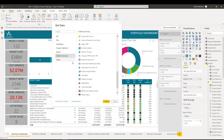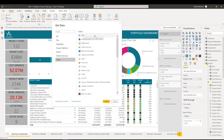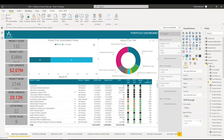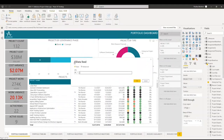If you click on Other and go to Web, this would actually allow you to connect to any type of web service. You can actually use this as well when you're connecting to different functionalities of SharePoint or even projects. However, what we would be using in order to connect to projects would be OData feed. When you click on OData feed, it actually takes you to a window where you would put your URL for your specific project site, and then you would authenticate in order to bring that data over into Power BI.